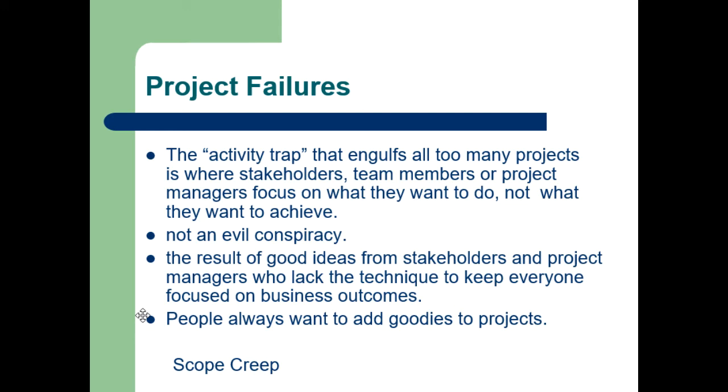What they don't understand is if you keep adding to the scope, one little thing here, one little thing there, and they're not adding to the budget, and they're not adding to the schedule, then at some point, very quickly, it would become impossible to do this extra work with the original money and the original schedule, the original time. So you need to be very, very careful about that.